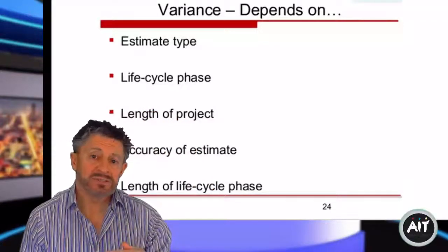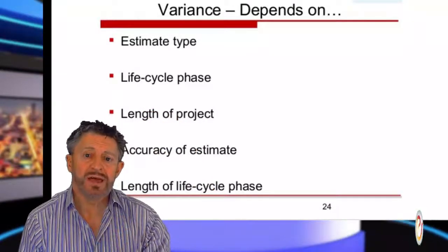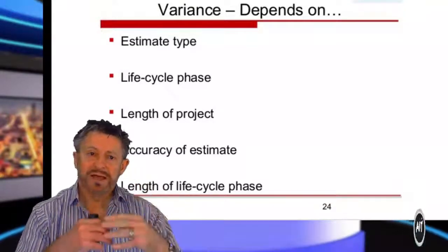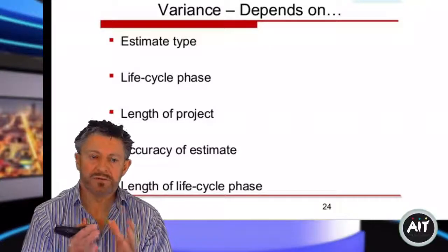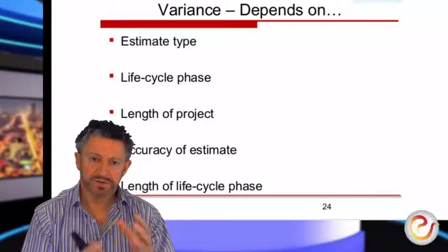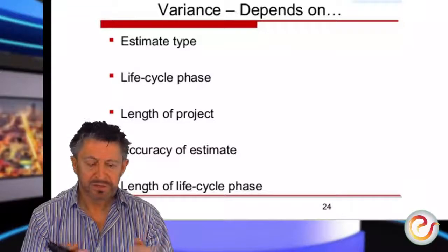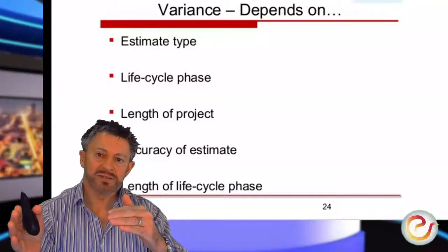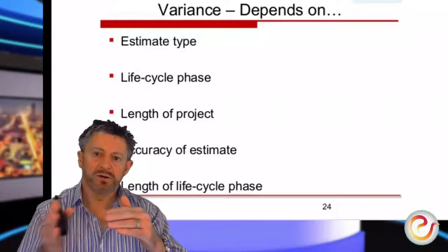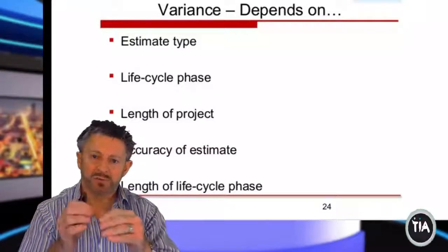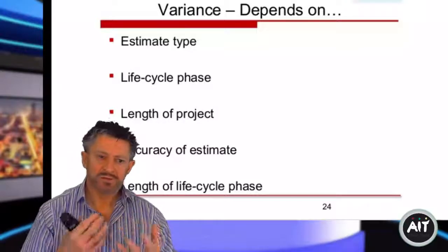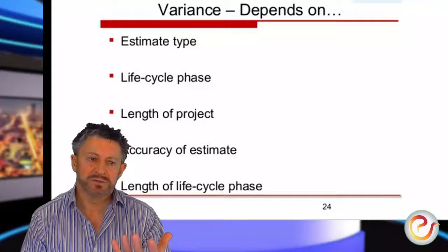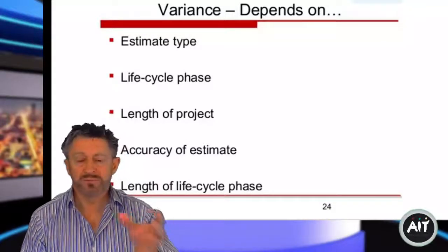And best case situation, I might finish it in 2.5 weeks. So I save maybe 2.5 days. So I have a bit of swing. And we always build in that kind of element into our projects, a little bit of headroom, as we call it, such that if things go wrong, then we know that the next sequence of tasks can start a little bit earlier or a little bit later, and we'll gain the time gradually. Okay, so having those kinds of estimates in there, and of course, if it's in the early phase of the project, you do have more time, so the length of the project is critical.